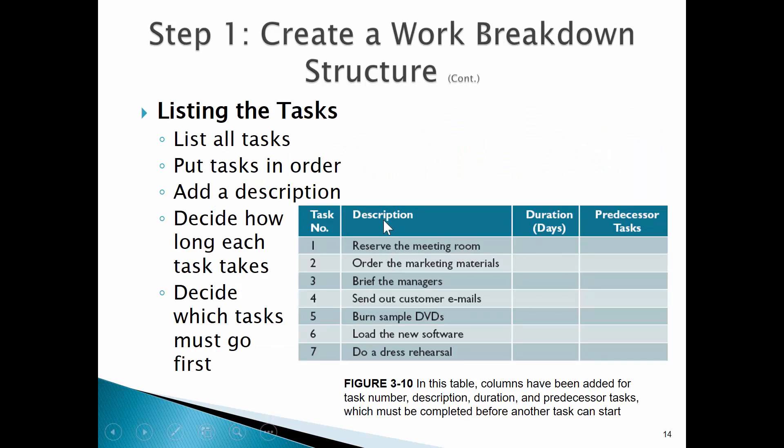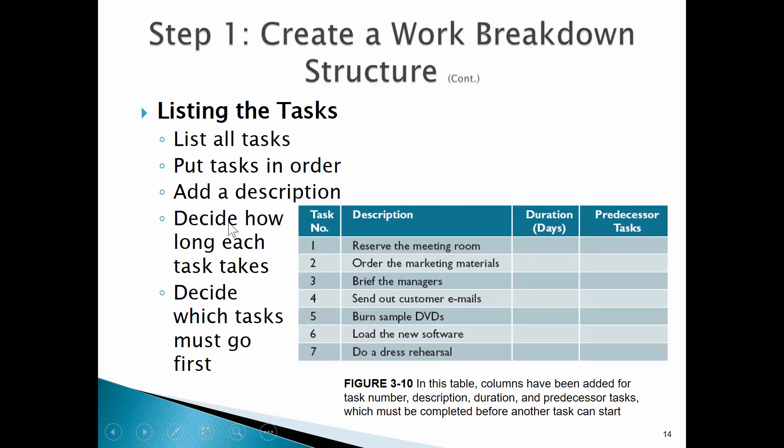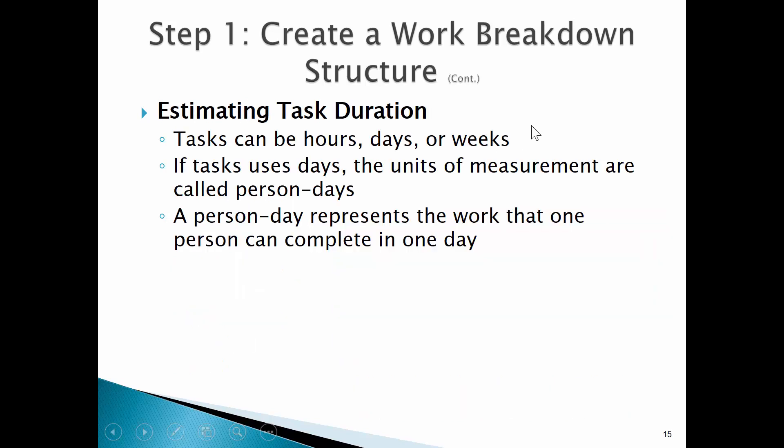Here's a nice task table. This might be where we start in Excel. Reserve a meeting room, order the marketing materials, brief the managers, send out customer emails, burn sample DVDs, load the new software. These can be broken down and listing predecessor tasks - tasks that need to be done before or after.